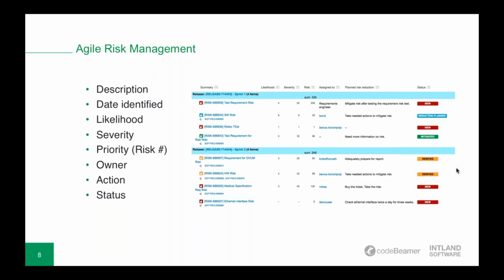Some follow the approach of ignoring risks until they turn into issues, which are the unexpected or unanticipated outcomes of risk, and then just manage these issues through the natural sprint progression. So this may not be a bad approach for low-risk projects, but it's definitely not a systematic approach, and things become quite difficult to document and can hurt traceability.